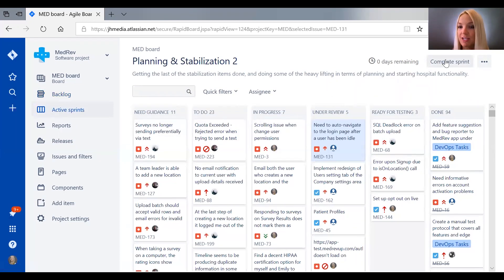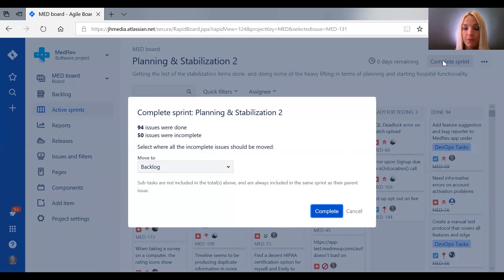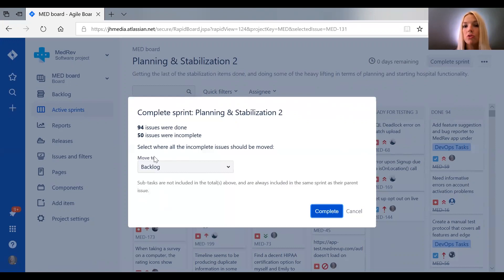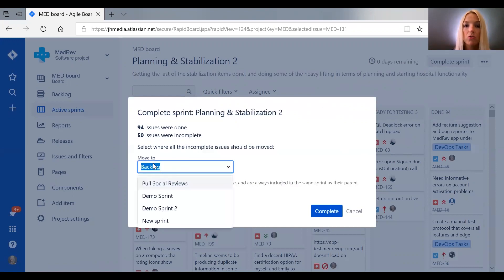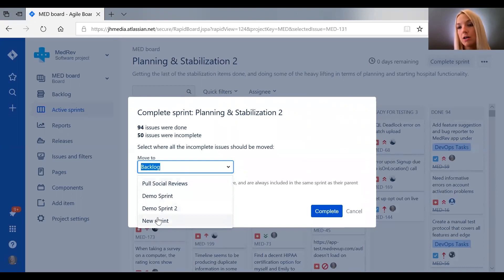Because a sprint is a length of time, not necessarily what you intended to accomplish during it. So you can hit complete sprint. And it'll say, hey, you did a lot, a lot of the issues are done. 50 of them weren't. What should we do with the ones that aren't done? So you can either move them to the backlog to be done at some later date, or you can put them into another sprint, or a brand new sprint. And so this way JIRA can automatically transfer over tickets that weren't done in the time that you anticipated they were done.